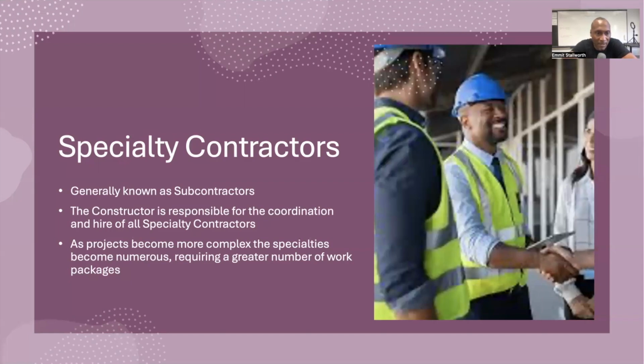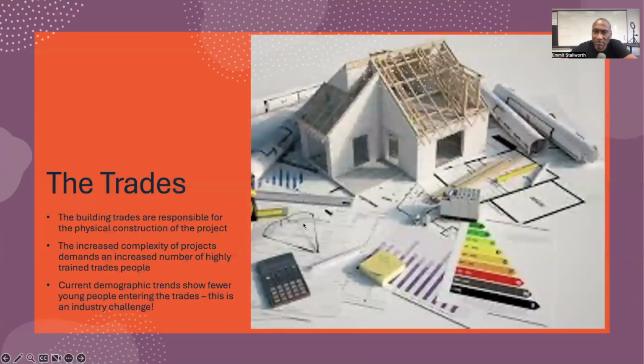Okay. Specialty contractors are generally known as subcontractors. The constructor is responsible for the coordination and hire of a specialty contractor. And in most commercial projects, you can always have a specialty contractor. As projects become more complex, the specialties become numerous, requiring a greater number of work packages. It's kind of what you got there. Everybody good? All right, let's get into the trades, man.